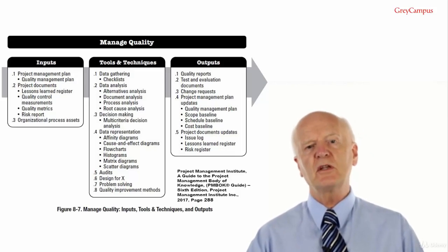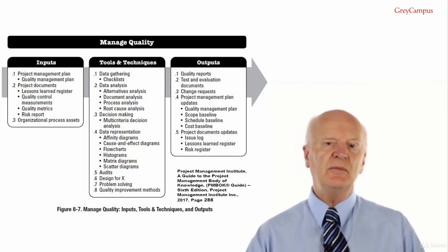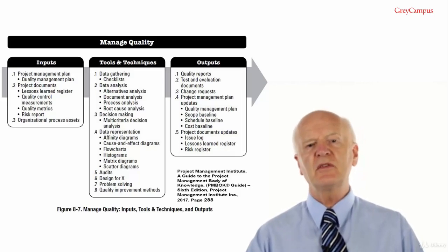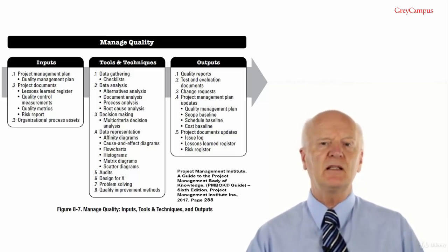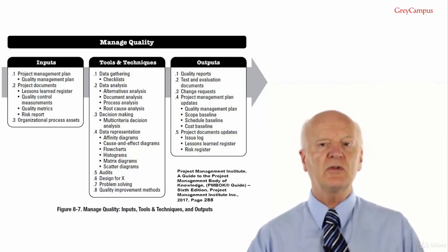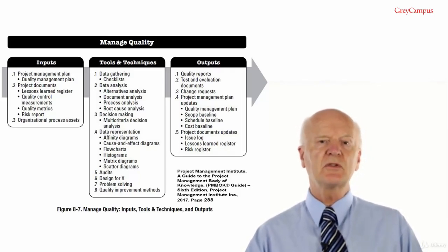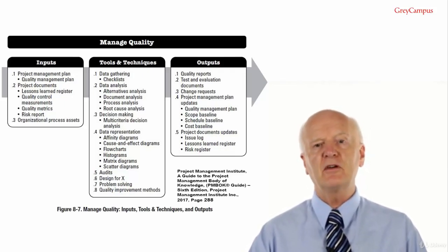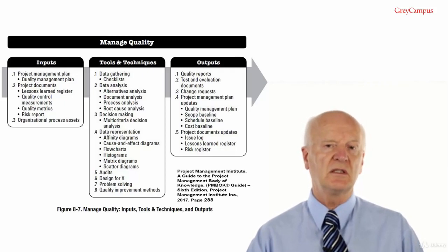Using a structured problem-solving method will help eliminate the problem and develop a long-lasting solution. Problem-solving methods generally include the following elements: defining a problem, identifying the root cause, generating possible solutions, choosing the best solution, implementing the solution, and verifying solution effectiveness.